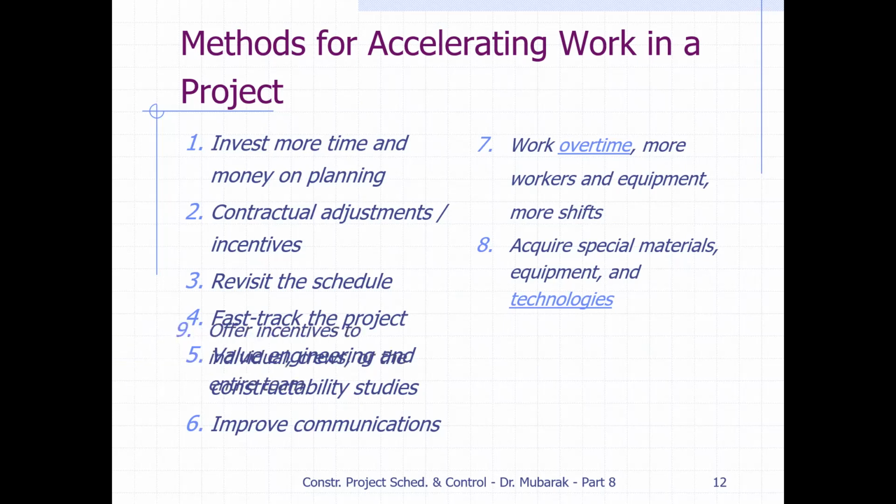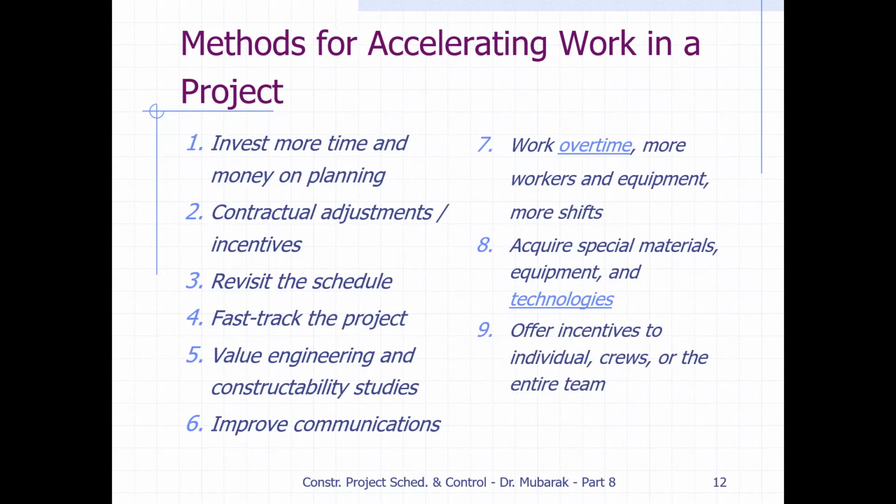Another method is to offer incentives to individual crews or the entire team. Sometimes they offer incentives like working overtime or paying extra money if people work a little more, paying more to the crews or to the entire team, so that they achieve more work, especially concreting work. Those activities are critical, so they don't stop; they work day and night. Other work can happen in one shift.